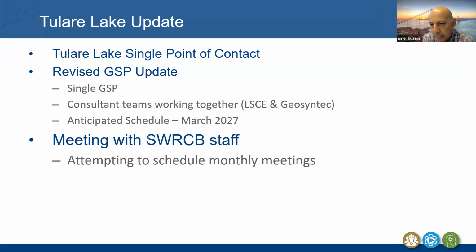So we've come up with a schedule that's very structured. It's going to give the state the opportunity to look at and understand upfront exactly what we're planning on presenting at each one of those meetings, with certain timelines of when we'll get them something to review, and how much gap there is before the meeting occurs, so that the state will have their chance to review all the information that we're submitting and come back to us with some comments.